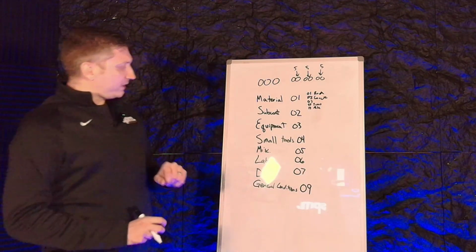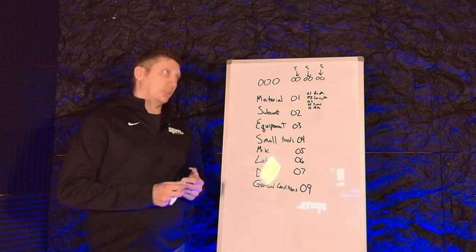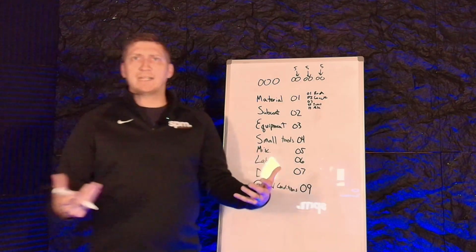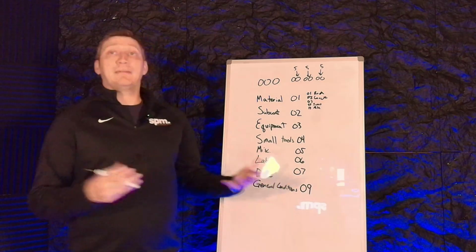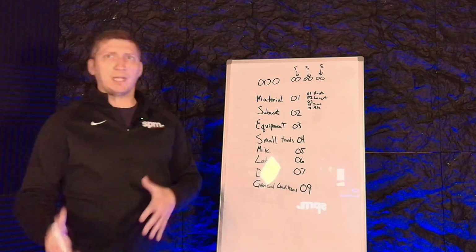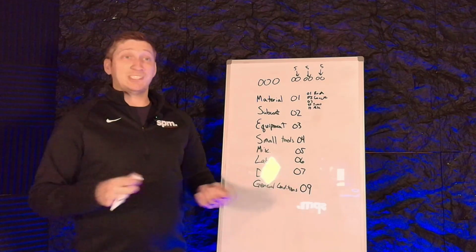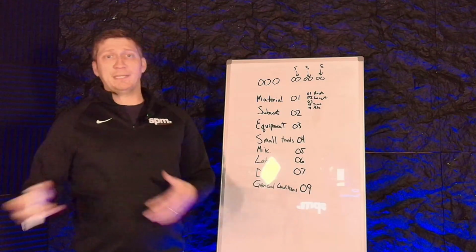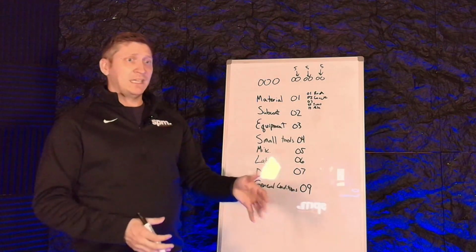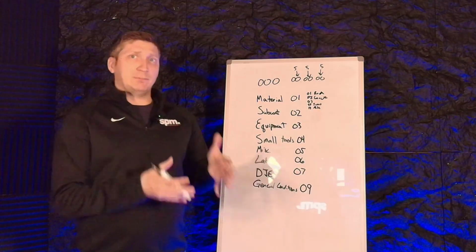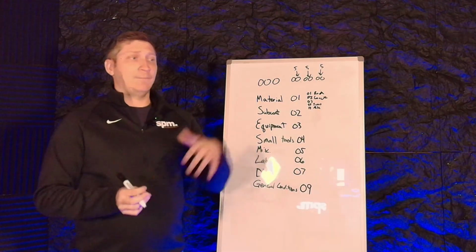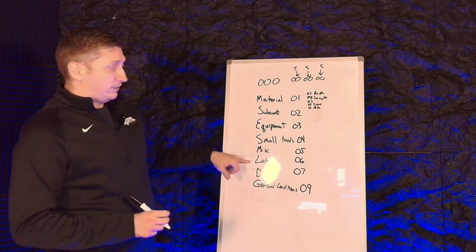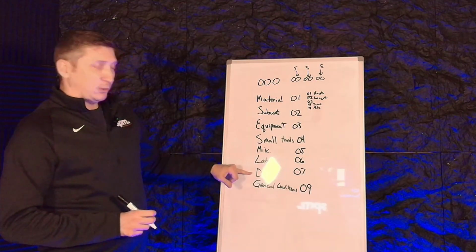DJE, these buckets are customizable, but these are direct job expenses, things that are required for the contract, but maybe you're not getting paid specifically to supply it to the job. Things like superintendent. They don't really build the project, right? They plan the work, they bring the people in, they coordinate everything, they go to the meetings, but not one hour that they do specifically translates to X amount of work installed in the field. That's the delineation between labor and superintendent.